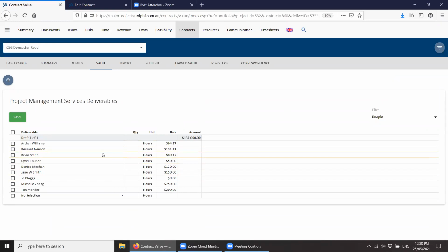Equally, if you win this job, you can then start to switch out the classification and transfer the hours into actual people so that you can get a more accurate estimate, because in consultation with some of our clients, those classifications are an average rate, and there tends to be quite a significant variation around that average rate. So when you actually assign real people to the project and they start timesheeting, the actual cost will come in either higher or lower by some margin, 10, 15%, based on the fact that there's some standard deviation around that mean of the rate.